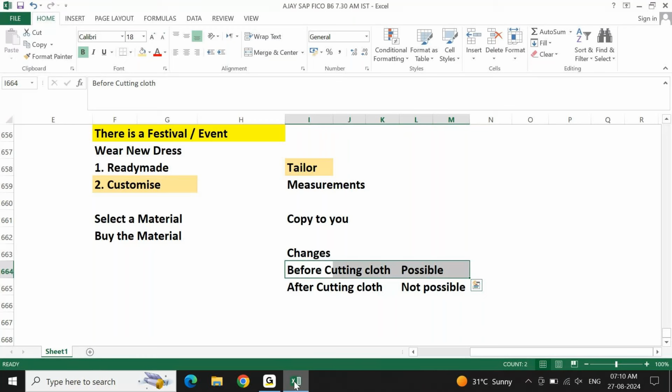So as a tailor, I need to tell, okay, this is the requirement, this is final. If you want to make any changes or corrections, please make sure, we will start the work from tomorrow, so by the end of today you need to confirm if there are any changes. Otherwise, changes are not possible. You need to tell this to the client, irrespective of whether your client is aware or not, because you know that you are going to be at risk here.